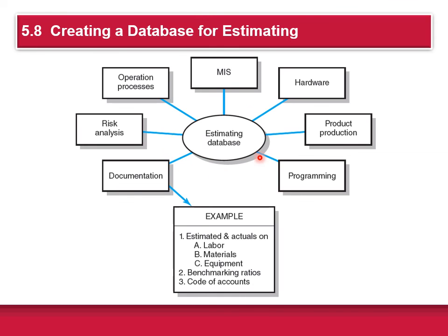And so any established firm is going to have a database of project estimates, and they'll be able to compare what they estimated the cost was going to be and what the actual cost was. Over time, the estimated value and the actual value will get a lot closer. That's typically what an established firm is able to do. And of course, new firms are going to have to learn by experience. They're going to have to build up this database to get better and better.